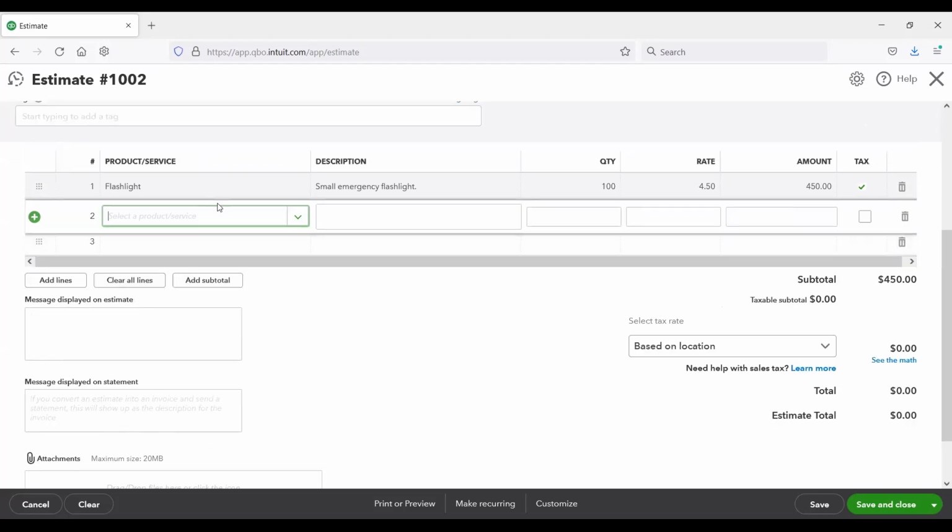So if we're doing more products, we could. Sometimes when they ask for a bid, they may have asked for flashlights, camping tents, and shovels. Well, I don't have camping tents and shovels, but I do have flashlights. So I'm only going to bid on that portion of it. And you can do that depending on the customer, if the customer allows it. If they don't, they should say it must be a complete bid or nothing, because they don't want to break them up. On the other hand, I might have such a good deal on flashlights they'll buy the flashlights from me and everything else from somebody else.